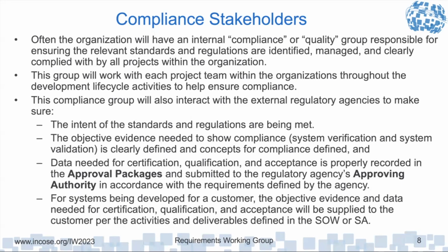And so this is really important when customers are outsourcing some of the work to a supplier, that they be thinking ahead to this compliance with standards and regulations. What are the activities they expect of the supplier? What are the key deliverables? And the customer has to be willing to accept the cost and the time it takes.